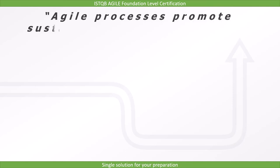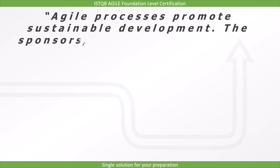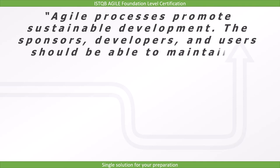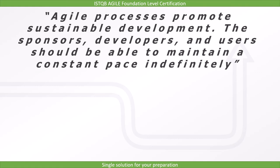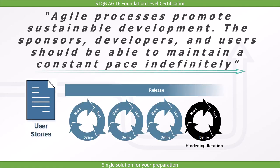The eighth principle is: Agile processes promote sustainable development. The sponsors, developers, and users should be able to maintain a constant pace indefinitely. Once we get the requirement, we make release planning. A single release can have multiple iterations of small duration, and in each iteration a few features will be developed. With this, we develop software at a sustained pace, and each member of the team must work at a constant pace.